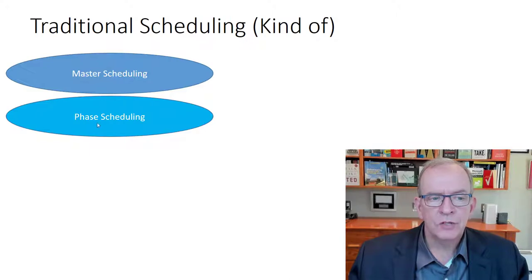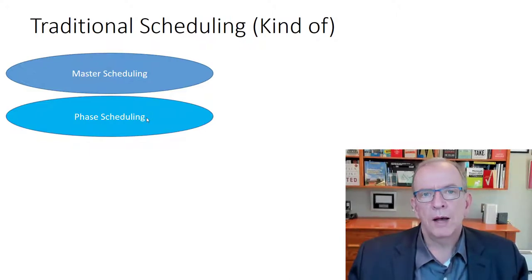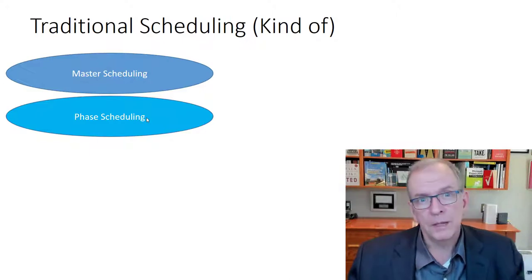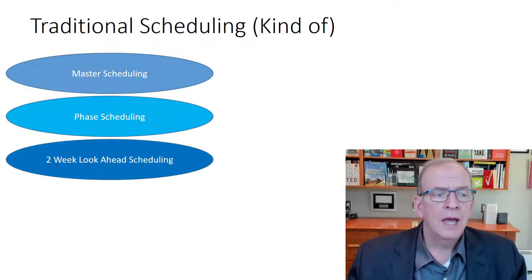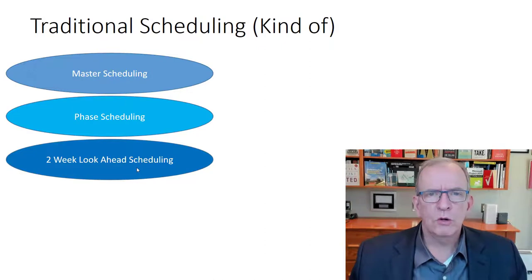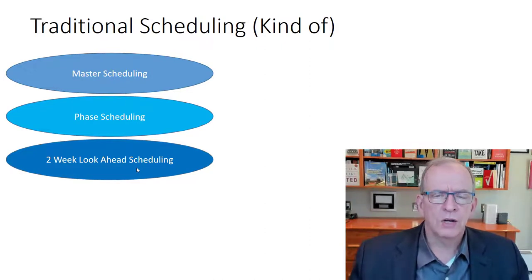And then we have phase scheduling which is more detailed up to milestones — that might take the role of a three-month short-term schedule, perhaps up to a milestone date depending on the length of the project. And then we have our really short-term look-ahead schedules. Probably the most popular would be the two-week look-ahead, but it might be three weeks, etc., under the traditional methodology.